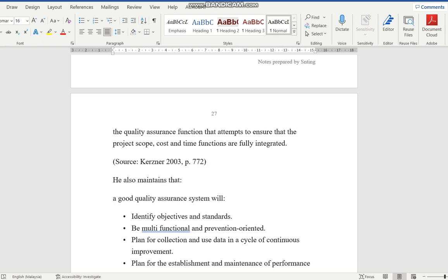And then after that, how to check, who checks, and who is responsible for checking or taking the samples, for example. And what time you need to take the samples, how many times you need to take the samples, how many samples, and then you send them for testing, what lab are you using? And then if the result comes up, what are the acceptance criteria? And if it doesn't fulfill them, what do you do next? You see, so this is basically a very systematic way of looking at activities.